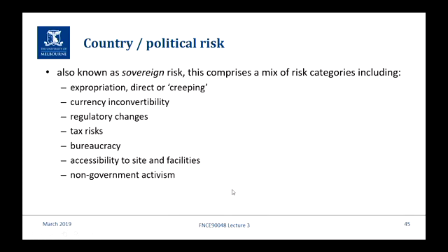I think I mentioned before that when we were discussing in our project where to put some of the wells on the field, the seismic data usually indicates where's the best access to the reserve. And I showed that diagram earlier today, it was directly above. But then you go out and survey the area and it's really hostile and very hard to, you can't drive down there because of the way the rock formations are and so on. So you actually have to start thinking about alternatives, so not necessarily your preferred site. Non-government activism, strikes, that sort of thing.